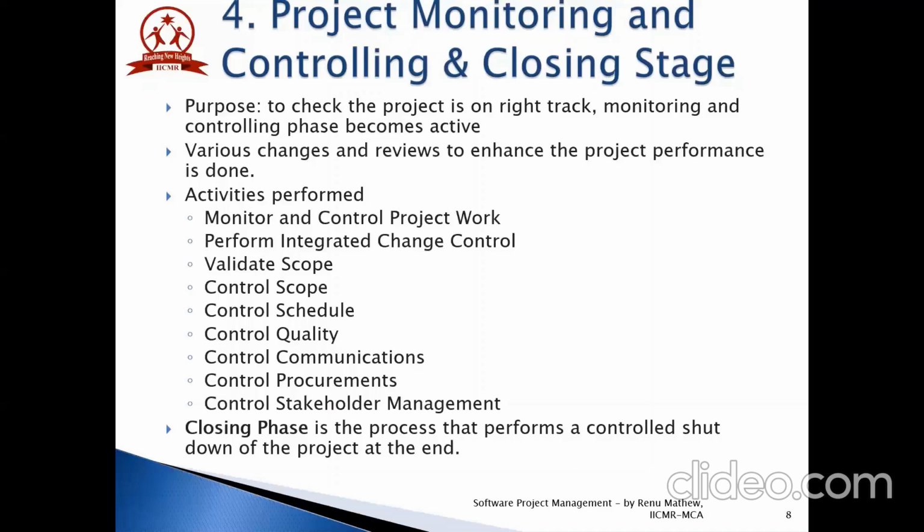Closing phase is the process that performs the controlled shutdown of the project at the end. In a project, there are three closure activities: closure of the product, closure of the project, and closure of the resources behind the project.